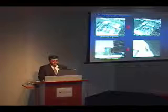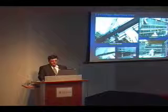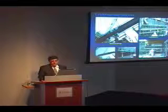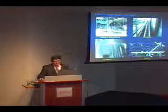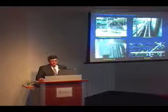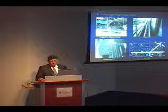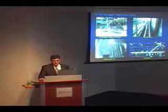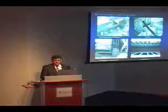This is the up-up method that you can see with what we talked about before. This is the auto-climbing form system for the screens. These are some of the link beams — they have very high shear stresses. Essentially, they have a structural steel beam embedded in them. Initially, the project had called for all-reinforced concrete, but we felt if we go with all-reinforced concrete at the outer guard trusses it may delay us a little bit, so we suggested using a composite system instead. The biggest issue was at the joint and how everything comes together.